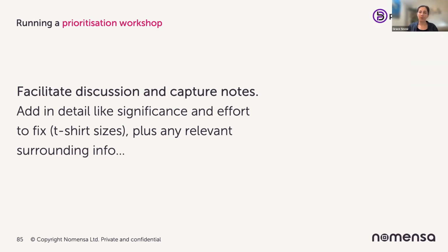Oh, we find out when we're in a prioritization workshop that this one component where we found 30 issues with it, it's about to be rebuilt. So suddenly that becomes a whole different severity almost, or a different urgency to fix because it's already being rebuilt. Will further support be needed to understand the issue or to fix it?